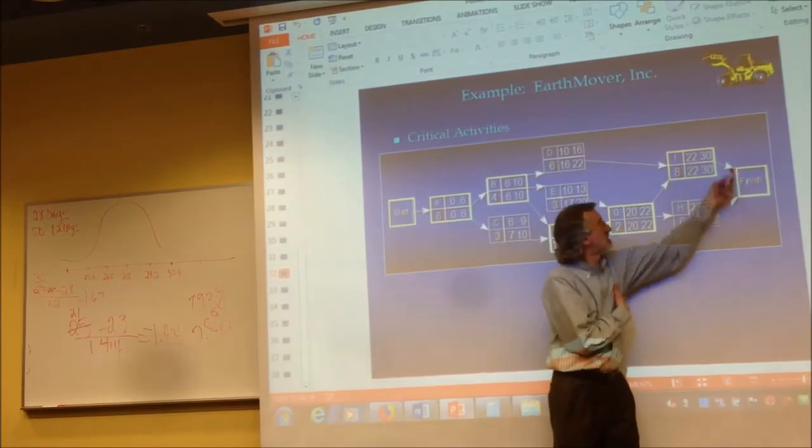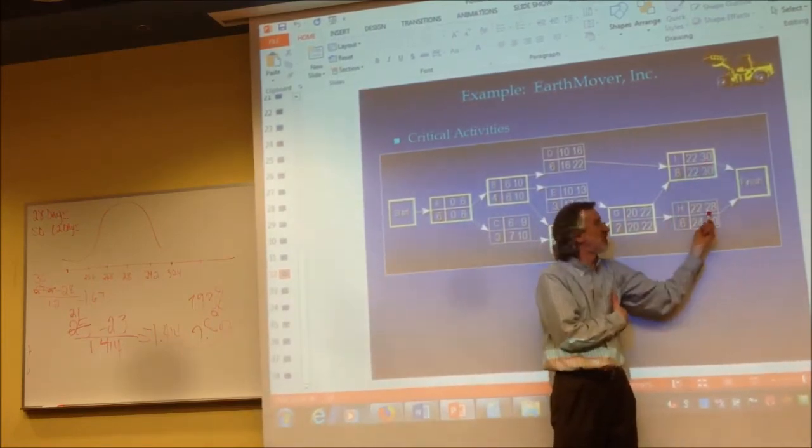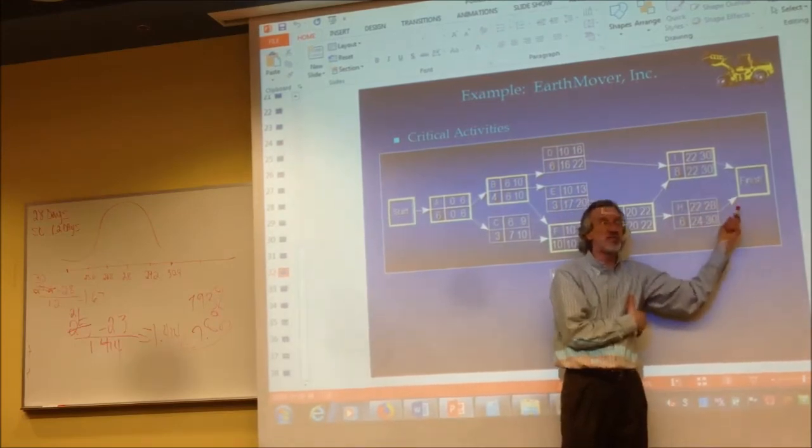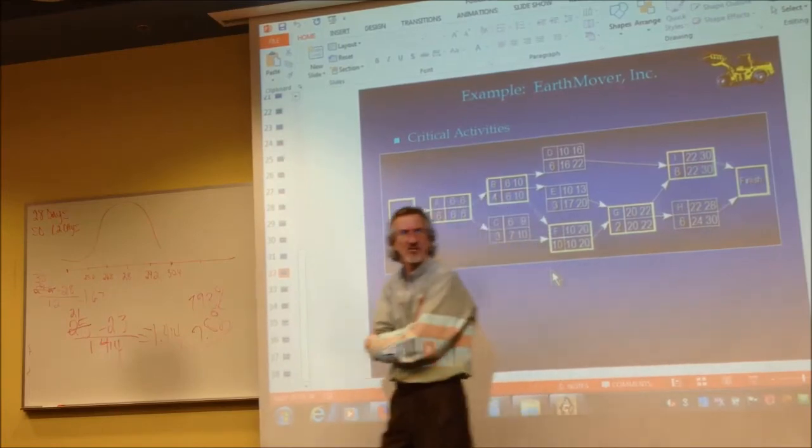Both I and H go to the end because they don't precede anything. The earliest I could finish is 30, the earliest H could finish is 28. They both have to be done for the project to be done. This project's going to take 30 units of time, weeks in this case.